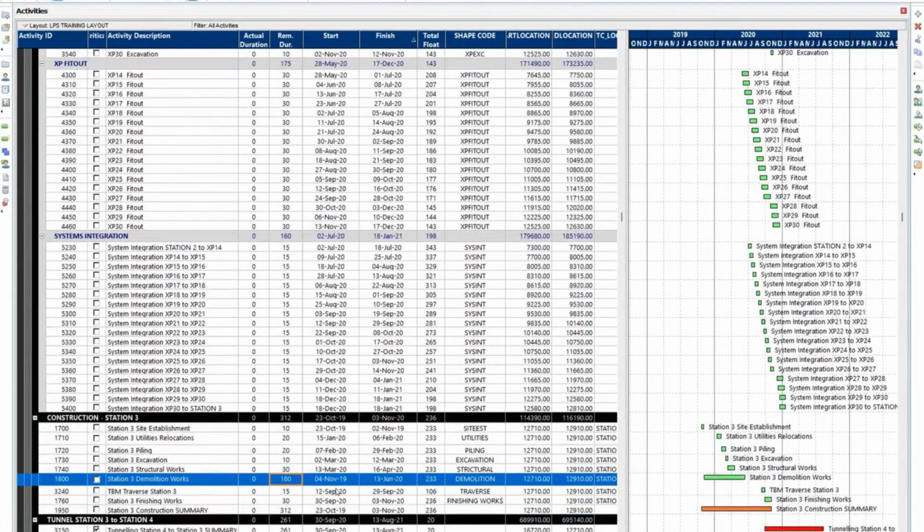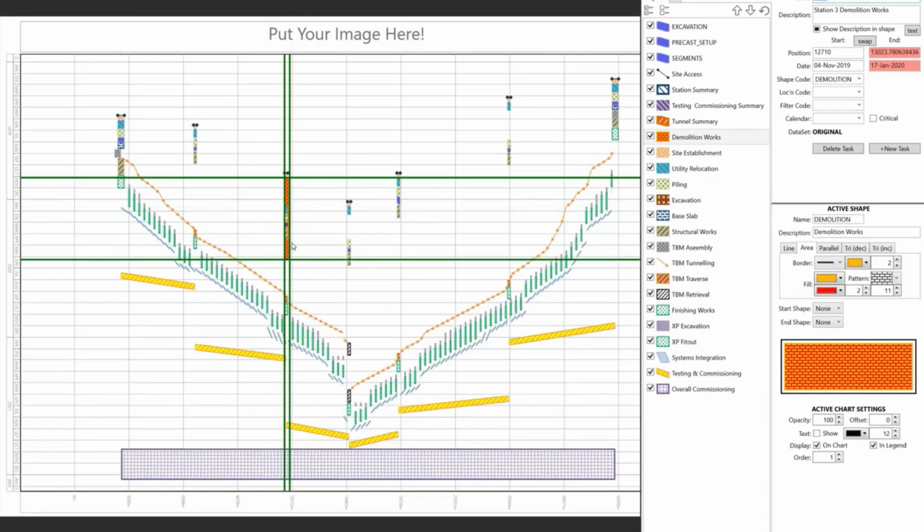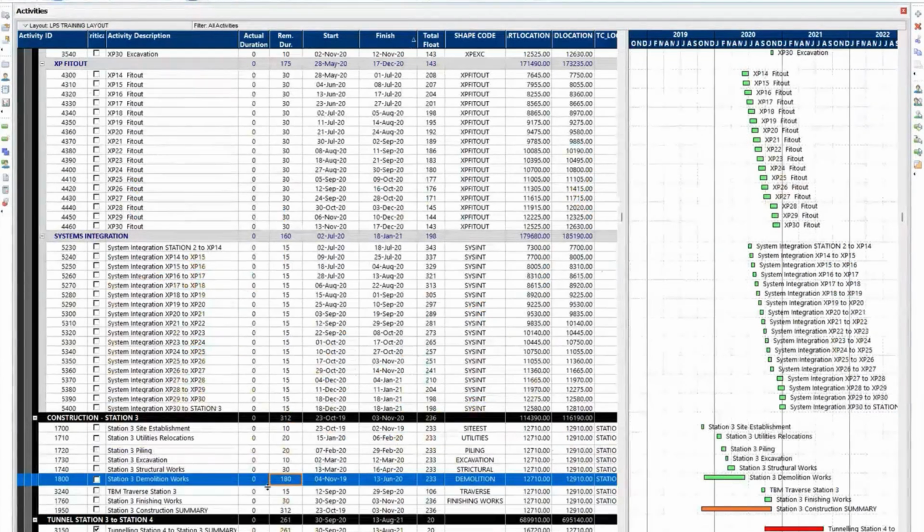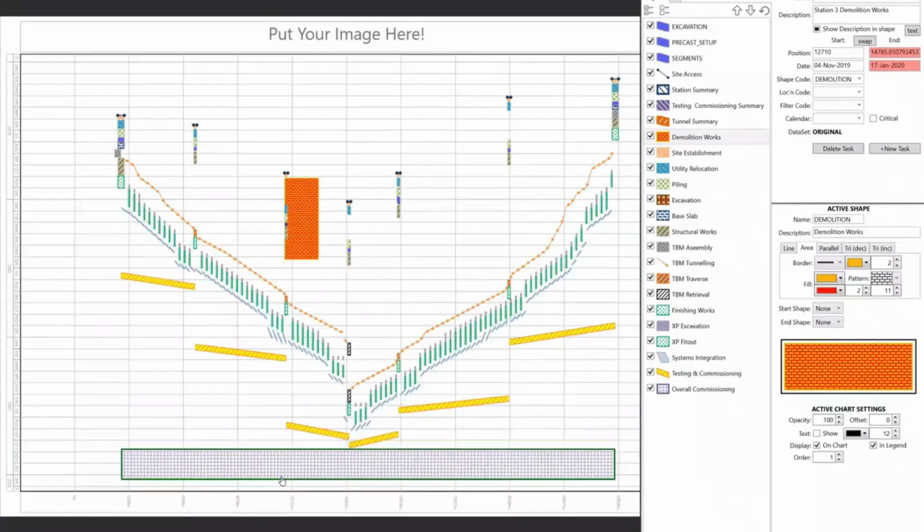Because here, the schedule is where all your logic is kept. Because the risk is, even if you did change this and change the dates, you may have missed some other logic that isn't relevant to the activities that are shown on this chart. You might have logic connected from somewhere else that isn't being presented on this chart. So our source was always, make the change here, press F9, and you can see if I do a resync how quick it is to see the impact of that change. But at least you're doing it in the scheduling tool where the calculations are correctly made.